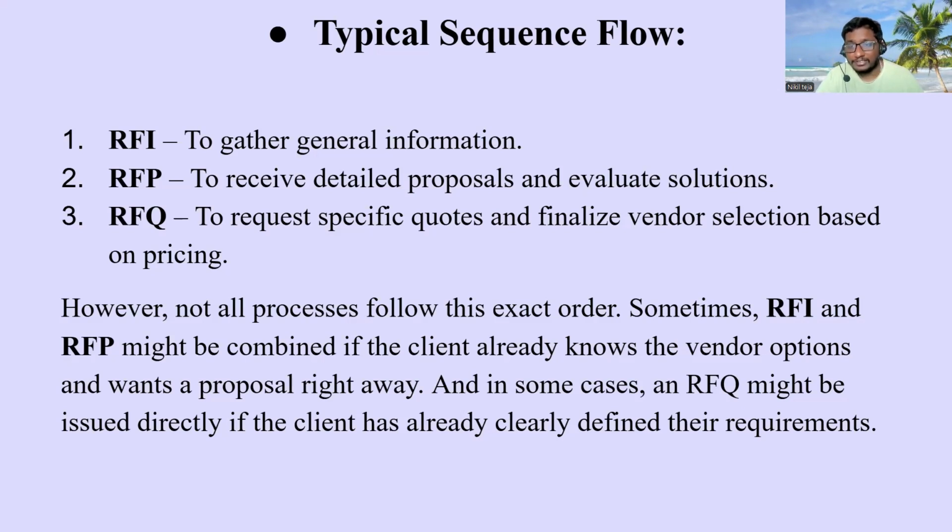And in some cases, an RFQ might be issued directly if the client has already clearly defined their requirements. As I said, if he has clear requirements and a clear picture of the vendor, he will be directly sending the RFQ to those particular vendors only.